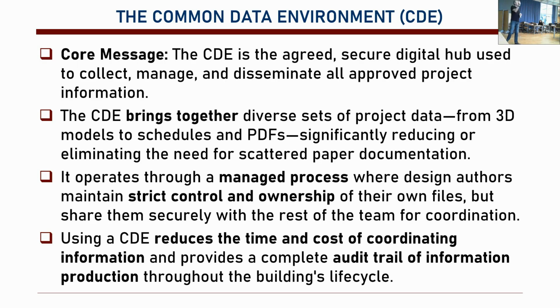There is an author for a file or an object, and that person could be an architect, a civil engineer, or a mechanical engineer. They hold ownership, and they have full authority on the file. But they share it with people. People can contribute by asking questions. They can then withdraw it back, make changes, and share it again. That's how it works. The CDE, in that regard, reduces time and cost of coordinating information, and as a result, we have the audit trail of information production. Audit trail is important.